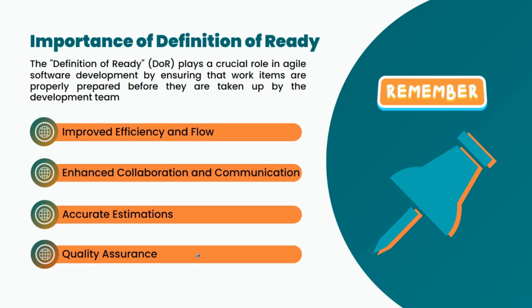So when the story is in to do status and you are picking those stories while discussing during backlog grooming, and all the points you want to make sure meet the definition of ready are met during the discussion, then you can change the workflow status from to do to ready.